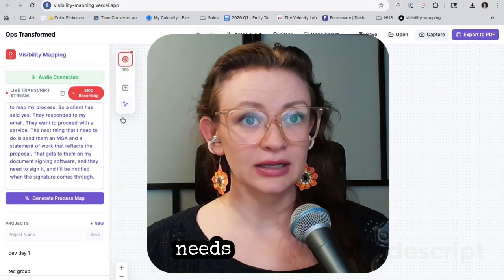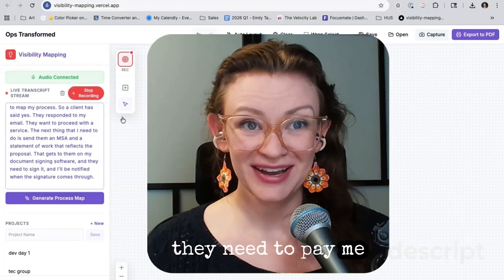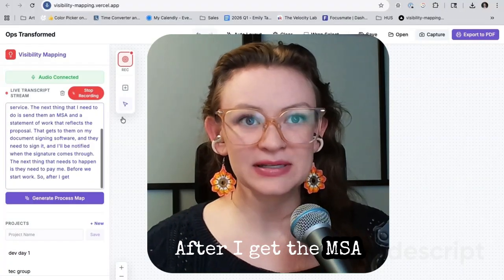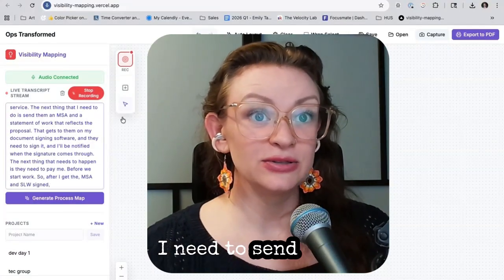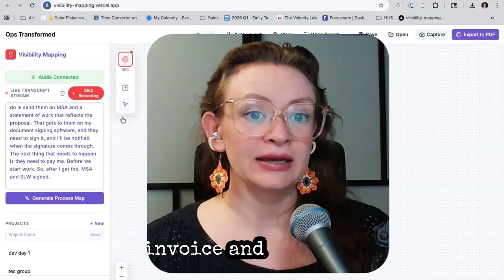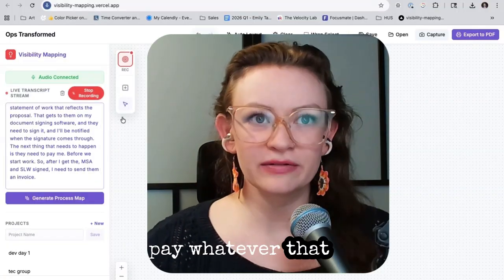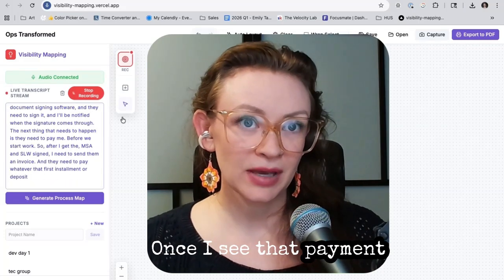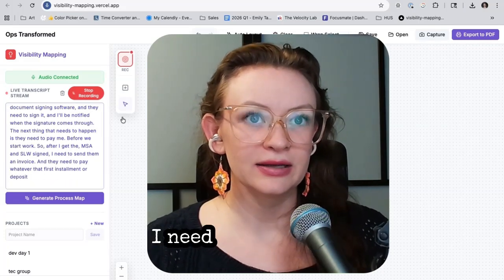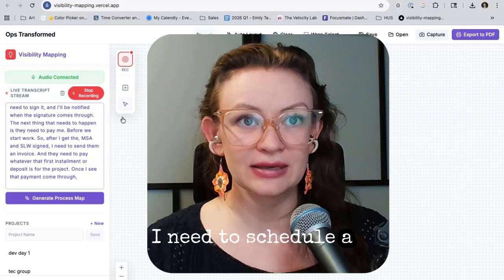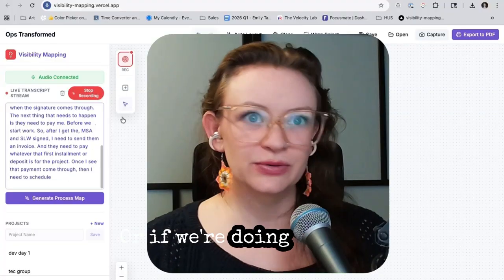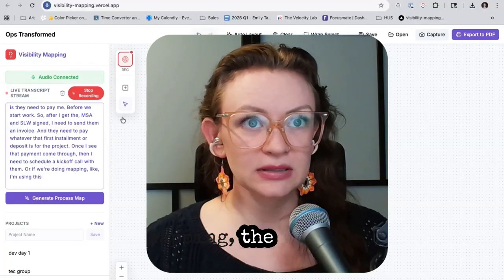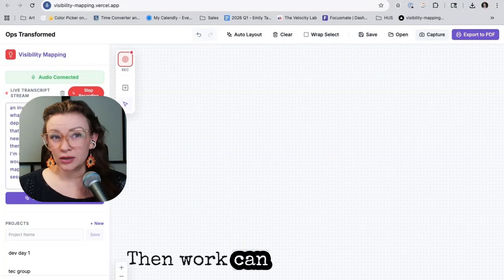The next thing that needs to happen is they need to pay me before we start work. After I get the MSA and SOW signed, I need to send them an invoice, and they need to pay whatever that first installment or deposit is for the project. Once I see that payment come through, then I need to schedule a kickoff call with them. Or if we're doing mapping, like I'm using this tool right now, we would schedule the first of the mapping sessions. Then work can go forward.